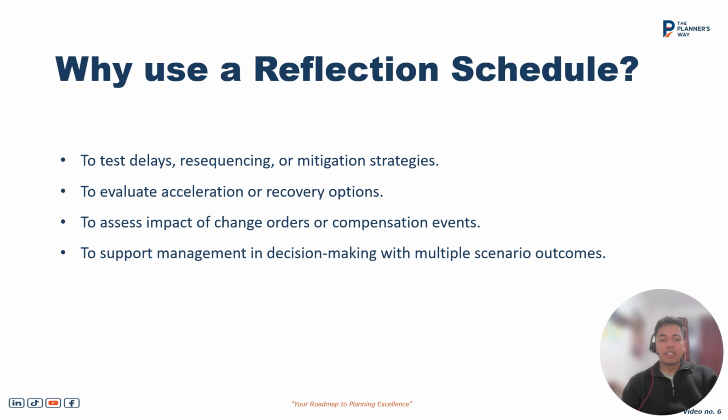Prior to the approval of the change order, we make a reflection copy of the last accepted program and implement the change order there to see the impact on the schedule before the change has been approved. It supports decision making for the higher stakeholders with multiple scenario outcomes, whether to go with this one or that one. So a reflection schedule is quite important regarding decision making for the higher stakeholders.